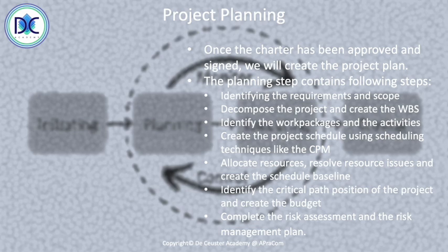the activities. Once we have the start and finish times, we will allocate resources to the different activities. Of course, we also have to understand how long an activity will take. So when we allocate resources to the activities, we can calculate duration and cost, which we need to create the Gantt chart.